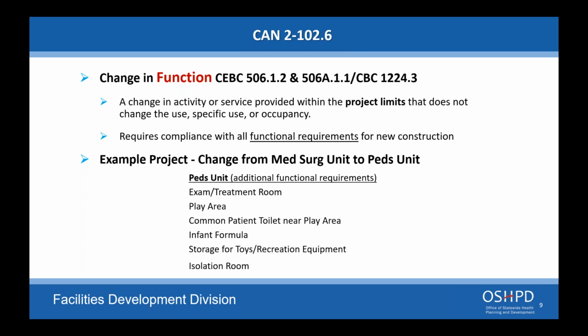If you have an existing alarm system that's not compliant with current code, there may not be any requirement to upgrade that as well. Say if you're going from pediatric to med surg, as I mentioned in the example before. But if it's a fire life safety issue, that may override the requirement. So I would definitely talk to your OSHPD team before submitting to see what the extent is.